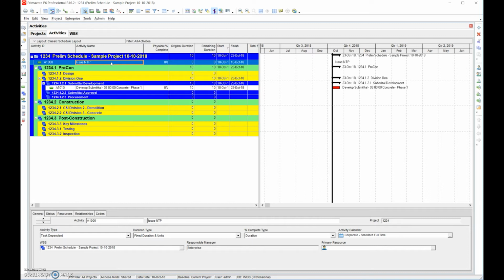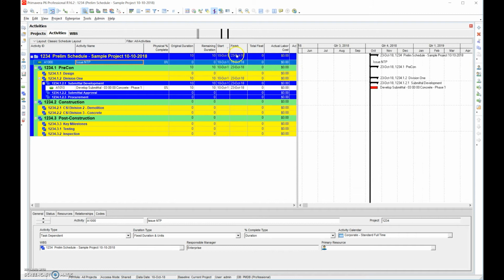Okay. The only other thing that I'll have to say is sometimes it would be good to put a column in there that deals with man days. There are two ways to be successful as a general contractor. First one is to get people to show up for work. Those are covered by duration days, right? So if we can get them to show up for work, they get a duration day. The second way is for them to bring enough people, and those are covered by man days.